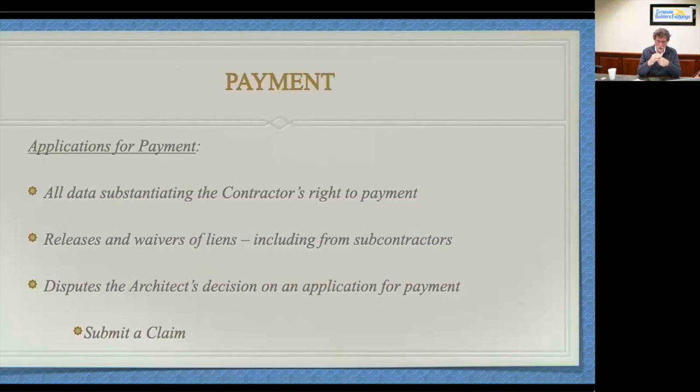What I typically do is give what I believe to be conservative advice to my subs and to my GCs. If you have open and outstanding extras, or an open issue with a delay or something of that nature, indicate that on the release document, attach it if you can, give us a call, but do something to flag open and unresolved extras and any delays that are out there, because very often we'll find language in these documents that says that's it.